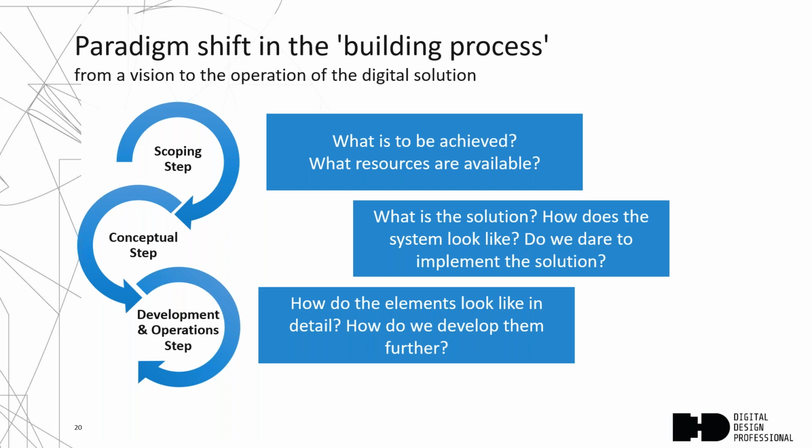The next step in the building process is the so-called conceptual step. Here you really think in terms of paper, in terms of concepts, in terms of models, and try to envision the solution that you want to build, and you design the system that realizes your solution. And very important, to a point where you and your team or your client can accept the risk of implementing your solution. Because typically the decision whether you implement it or not is very often taken for granted if you really jump into the detailed processes.